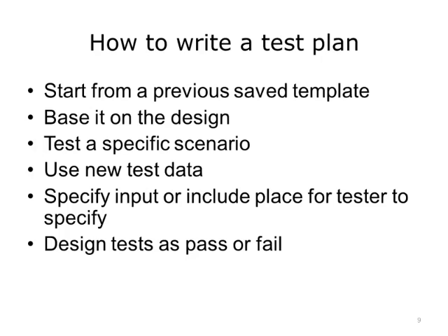First, do not start from scratch. Find a prior test plan whenever possible. As noted before, use the design document to guide the test scenario development. Make sure to test all possibilities. Test a specific scenario. Variations should be new scenarios. Specify input or include place for tester to specify.